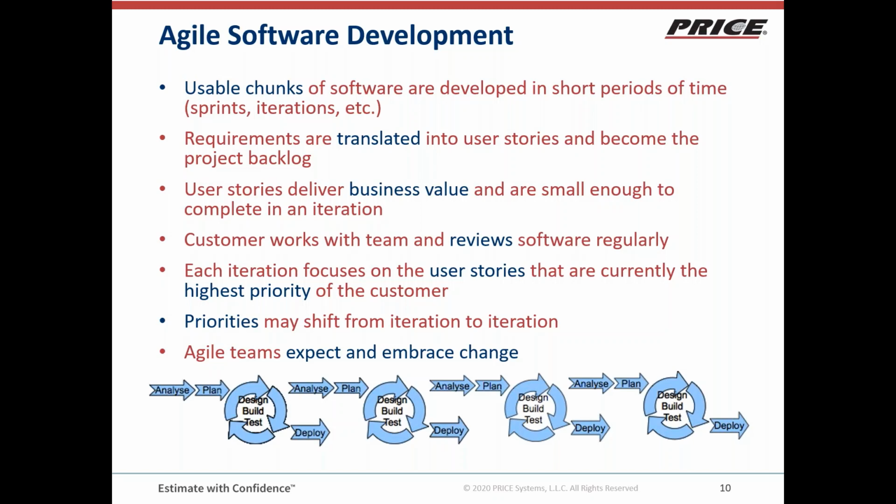It's not a formal release where you have to check all the installation software and stuff like that. It's an informal release, but it offers the customer an opportunity every 2 weeks or every month, whatever your iteration length is, to look at the software that they said was the most important to them, see if it's what they expected, decide maybe that's not exactly how I wanted it to be implemented.